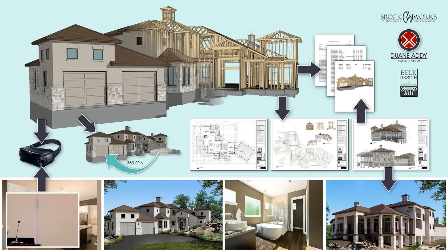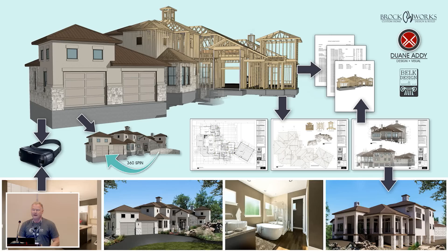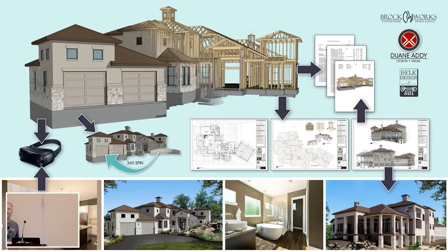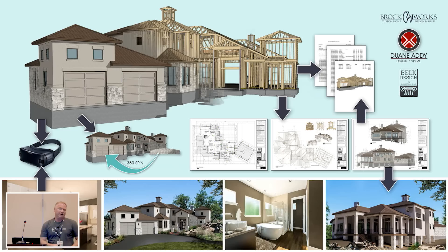Larry Belk designed a house in Texas and hired us to build a full model down to the stud, every outlet and switch. Everything was estimated, and Dwayne did all the working drawings and renderings — all inside SketchUp except for the rendering. For example, I gave them the specification for how many sheets of drywall — 4x8s, 5x4s, the whole nine yards. The builder's quote from the drywall contractor was 40% higher than my numbers, but when they ordered the actual boards based on my count, it was pretty spot-on.